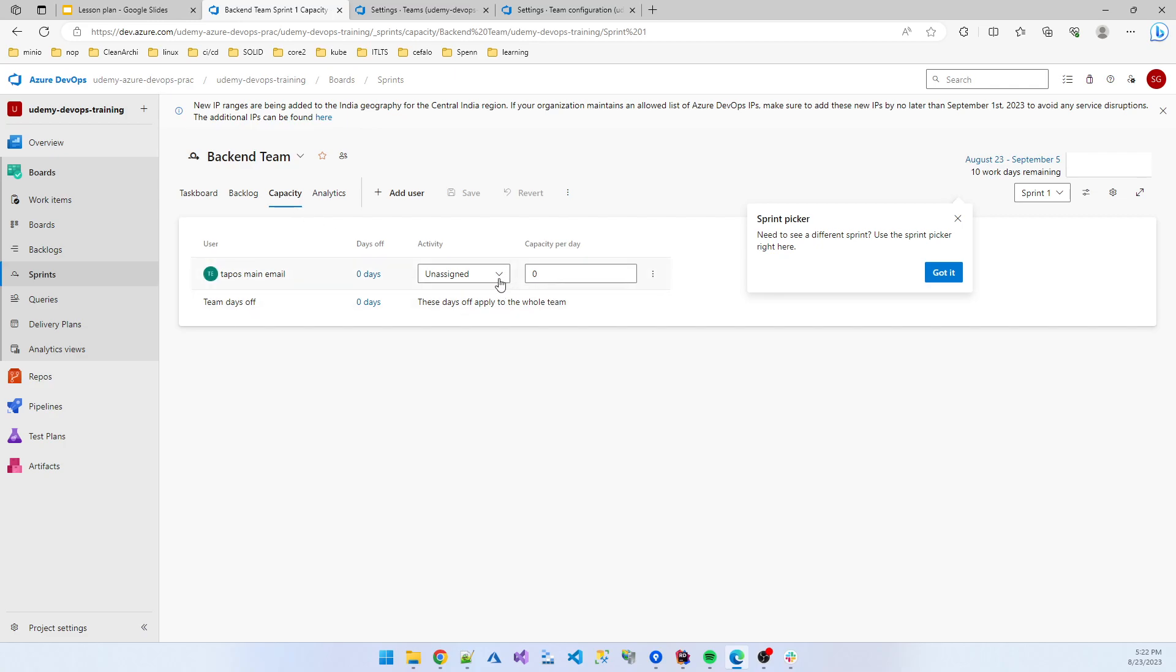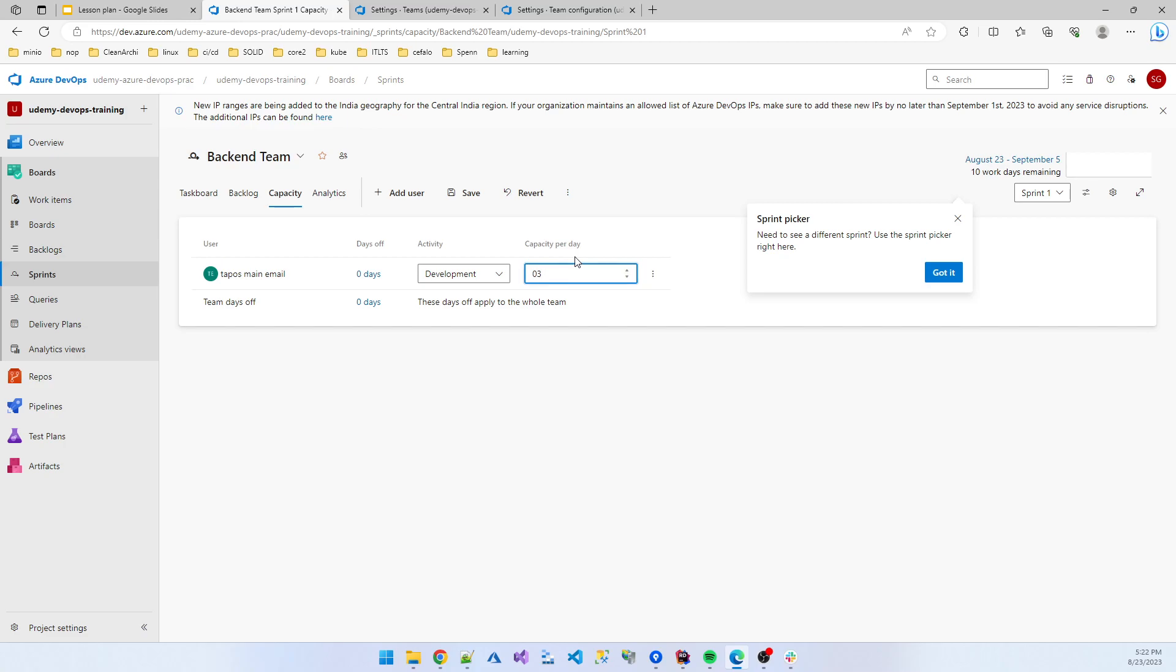Suppose this user is a development capacity per day. Best scenario is six hours per day for a senior developer, or any new developer joining your team, that time three hours is for your working capacity per day. Because the new developer doesn't know all the features and workflow properly, so that time they need more time to complete some tasks. So for any newcomer developer, three hours per day is best scenario, and for senior developers working for a long time, six hours per day is the best scenario.